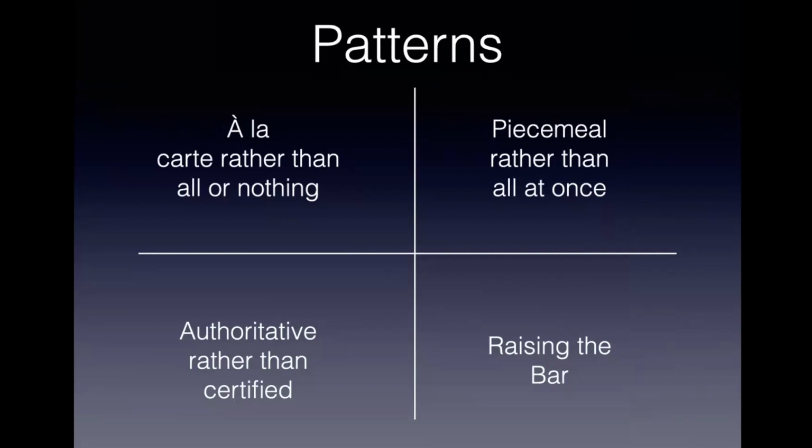So the first is, Scrum is 3 roles and 3 artifacts and 5 events. And that's a simple description of Scrum. If you look at the details, it's a lot more than that. And maybe there's 100 or 200 things you need to do. Well, does everybody need to do all 100 or 200? Does everybody need to use estimation points? Or can you estimate by splitting everything down to the same size on the sprint backlog and using the no estimates technique? Well, you know a lot more about your Scrum team than anybody making certification does.